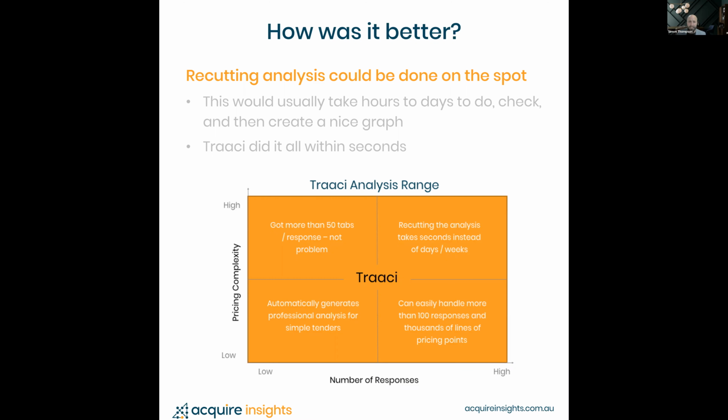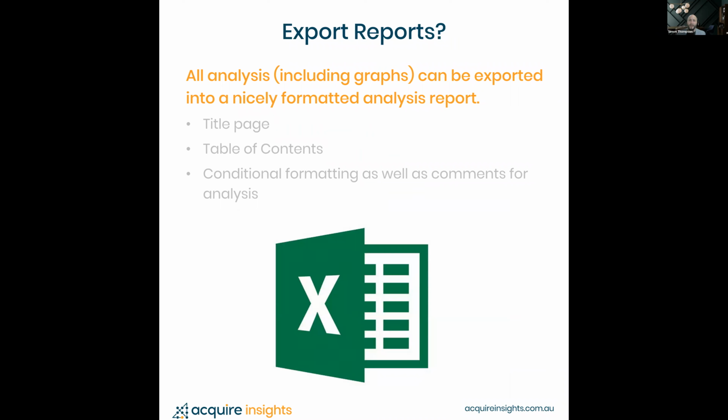So for this specific case study, one of the big things was that it's doing all the analysis, and if you've got it on an online system, you go, well, that's great, but we need to actually put it into a report so we can get all the stamps of approval. It needs to go through those delegation of authority levels, everyone gets the sign off and things. So you need an actual report. So this tool exported all the analysis into an Excel document.